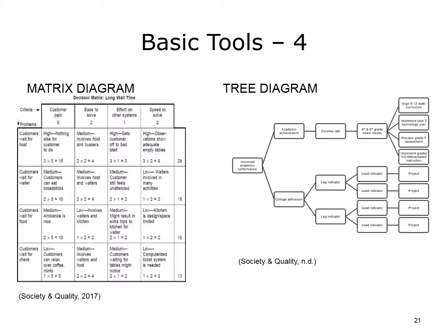Tree Diagram. A tree diagram helps to identify the tasks and methods needed to solve a problem and reach a goal. It creates a detailed and orderly view of the complete range of tasks that need to be accomplished to achieve a goal. The tree diagram can be used once an affinity diagram or interrelationship diagraph has identified the primary causes and relationships. TOG 2004.